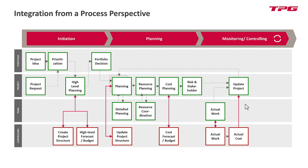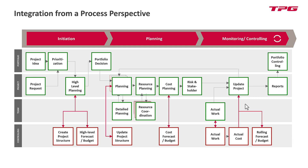Additional primary cost — for example from invoices and purchases — comes on top and is usually captured on the ERP side and transferred down into the project. Something we will show in the live demo later on. With all that, we have a rolling forecast and budget on the ERP side, we can create all the reports needed on the project management side, and can go into portfolio controlling that allows full insight into planning and actuals.